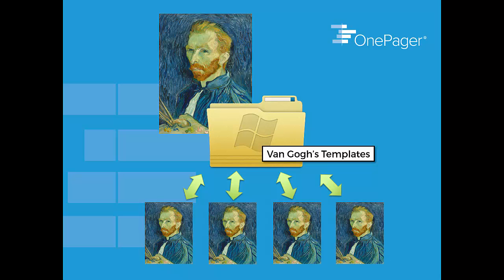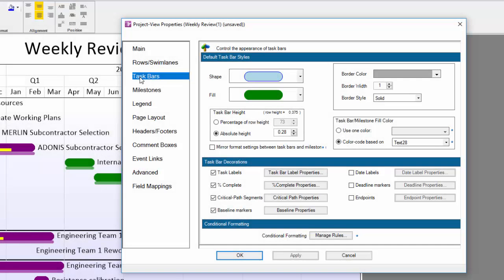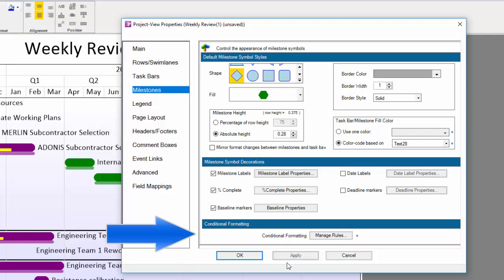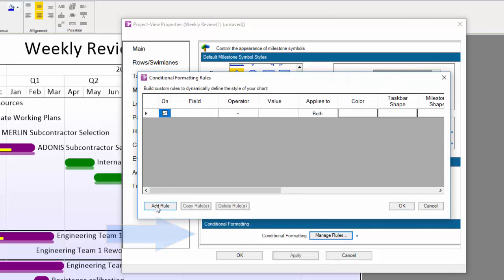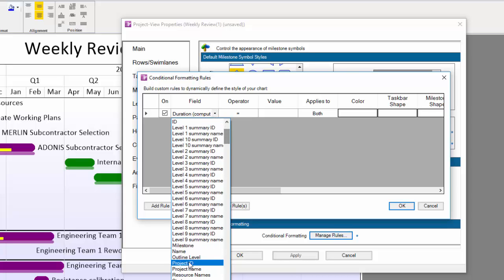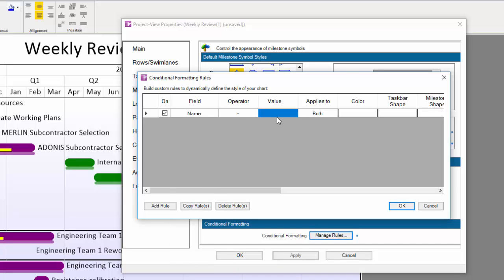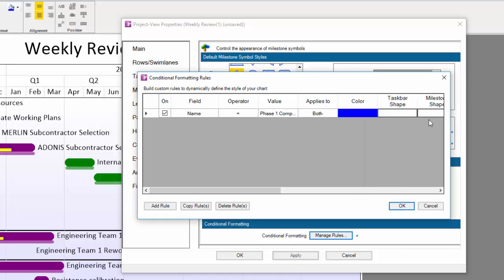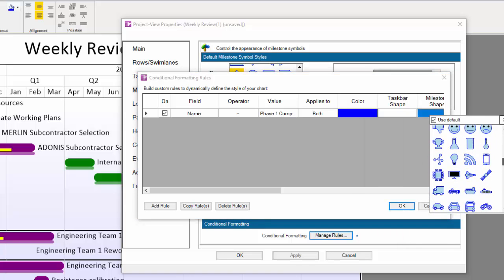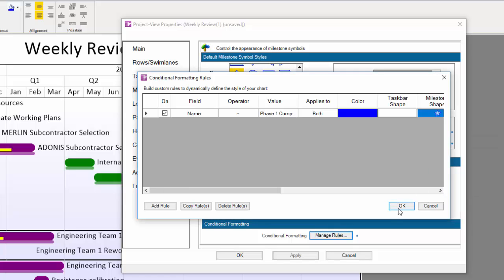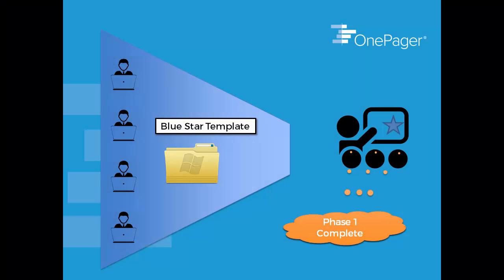Templates can also allow you and your team to very quickly and easily achieve a certain level of standardization using conditional formatting. Back in the Task Bars and Milestones tab of the Project View Properties, there is a setting that says Manage Rules in the Conditional Formatting section. With dropdowns, it's very easy to quickly build rules to tell OnePager how you want your tasks and milestones to appear. For example, I could tell OnePager if you see a value of Phase 1 Complete in my Task Name column, I want you to make this shape appear as a blue star.